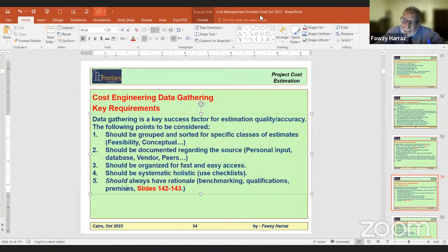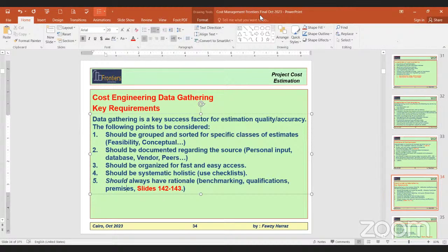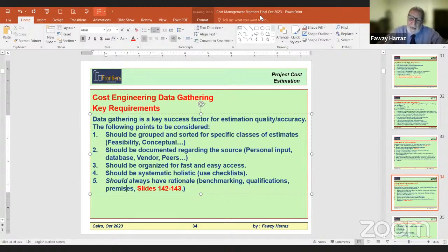At a certain time, if he is substantially below the benchmark price for the bid, that is your estimate, you are the owner or the consultant, you have your estimate. If the bid is substantially lower than the benchmark estimate, which is yours, he will not complete. If the bid is 90% or 80% of your benchmark estimate, he can go; he can finish the job with marginal or no profit. But if it is 30%, definitely it's a losing job, and he will not complete the job. He will start considering the black scenarios of requesting changes or being unable to continue.